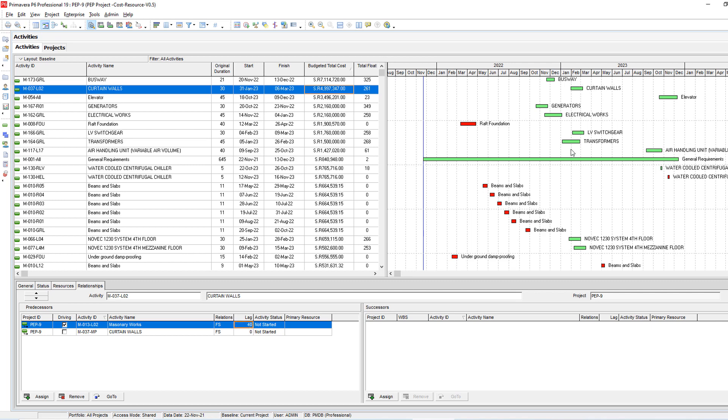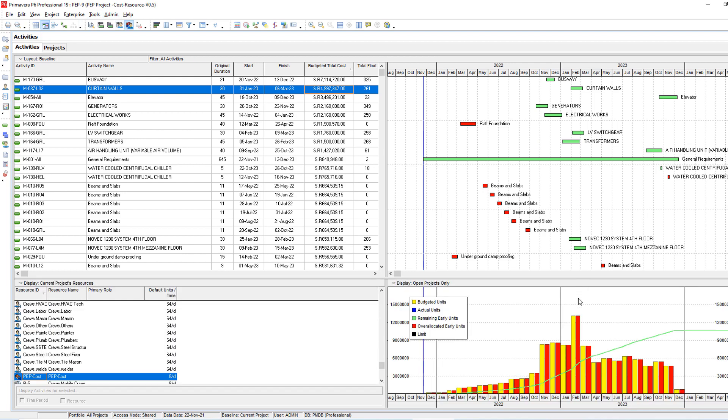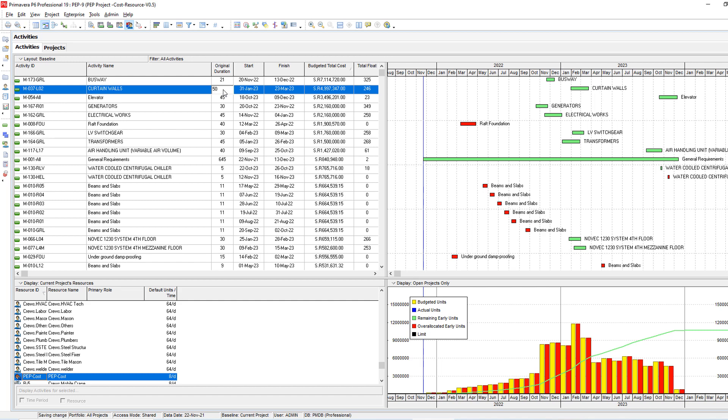I need to be between February and March. Now I have November, December, January doing great. Now I have the problem in February. In that case I can do one more trick to increase the duration of this one. As you increase the duration, the weight will be in two months instead of one month.